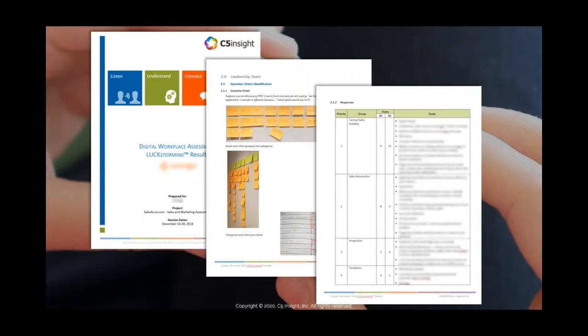It's pictures of the stickies put into tables, and reports we've run and pulled out of CRM, because that's part of listening to people too, and survey results, whatever that is. One thing that says this is the raw material. And ideally it comes together very quickly, because when you run these right, it's almost self-documenting. So you don't have to wait 3 weeks after you do this to say, okay, I finally got this document together. Hopefully within 1 week after you do it, and it usually takes somewhere between 2 hours and about 8 hours, depending on how systematic you can be, you can put all of this together and say, here's the raw material findings.